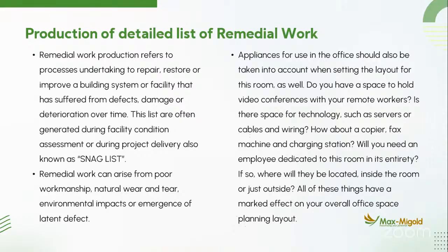The assessment you are doing is to see if the contractor used, for example, a 1.2 m breadth of door, and the guy eventually used 900. If the window frame was supposed to be something, what was there is a glass door. These are what you start itemizing, and you make a list of these and send to the contractor to execute before he can get his balance of the project cost.